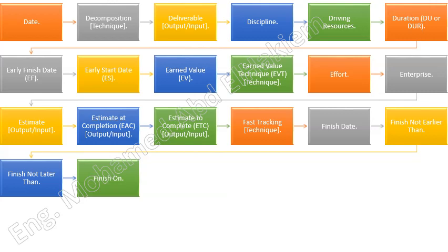Finish on. A schedule constraint placed on the schedule activity that affects when a schedule activity can be scheduled and is usually in the form of a fixed imposed date. A finish on constraint prevents the activity from being scheduled to finish earlier as well as later than the imposed date. Finish on constraints are a combination of not earlier than and not later than constraints. These impact both the forward and the backward pass calculation and hence both early and late dates. This causes the schedule activity to have a zero total float while its predecessors and successors may have different total float values. Finish to finish, FF.